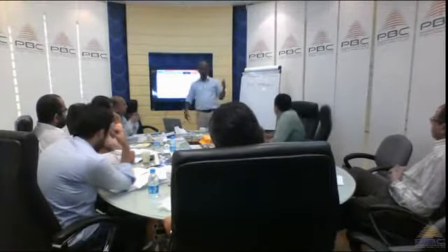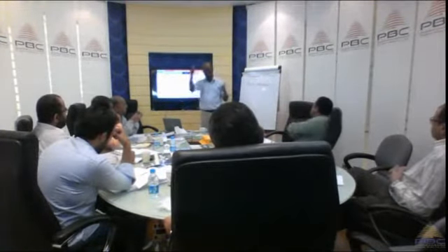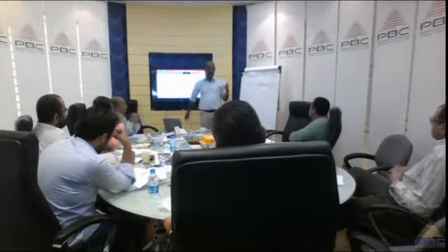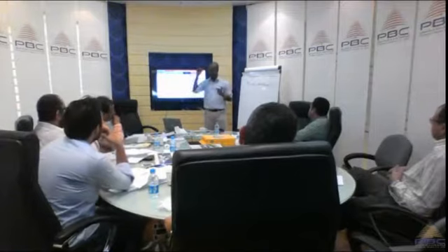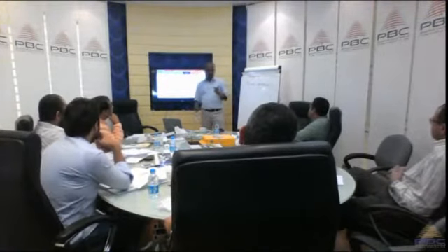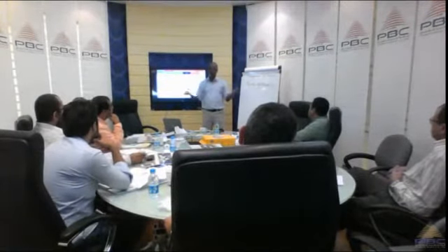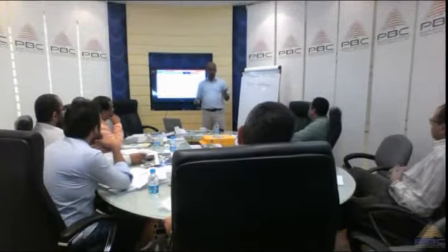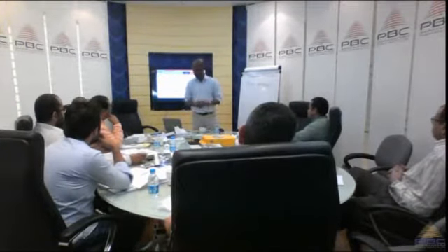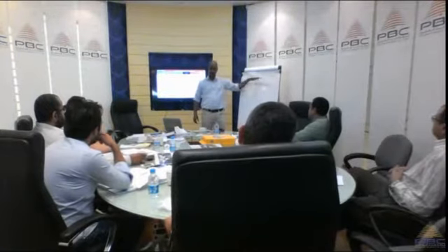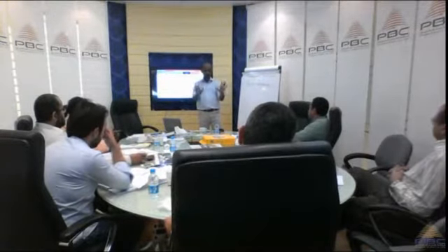Management by exception means what? I wait until Thursday. Wahib delivers A, good job. I don't have to worry. Week 2, Wahib delivers B by Thursday, fine, no problem, and he never asked for any help, he's doing his job. Week 3, he did not deliver C on Thursday. Now I interfere. So here, what's the problem? This is called management by exception.